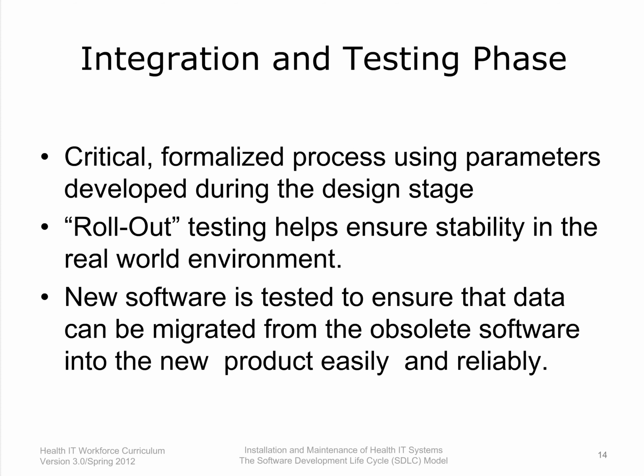Slide 14. Integration and testing of the entire system is a formal, documented testing procedure, which ensures that the system performs as designed. Testing the rollout of the system also begins, including migration of existing data into the new system, as well as usability. Usually, the system is rolled out over a weekend so that if anything goes wrong, the old system is still active and available.